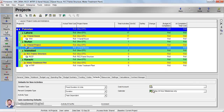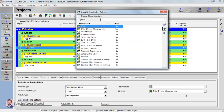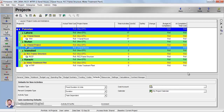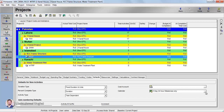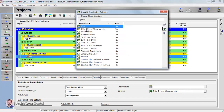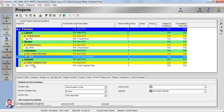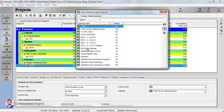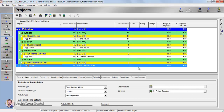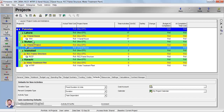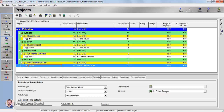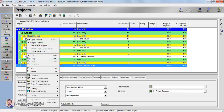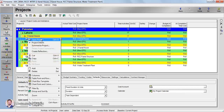Similarly, for the other projects, some other calendar is assigned by default. I'm going to assign 'My Project Calendar' to each project. On the last project as well, I'm assigning 'My Project Calendar.' Now if you click, you can see the calendar has been assigned as 'My Project Calendar' for all projects.